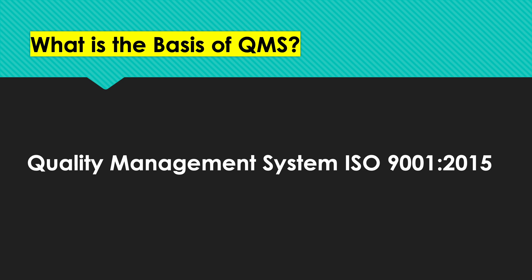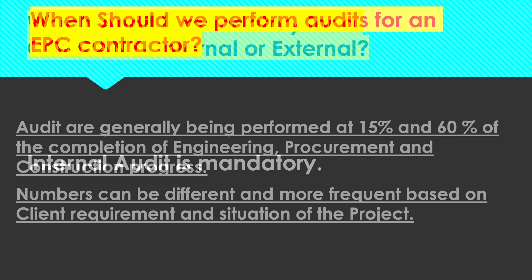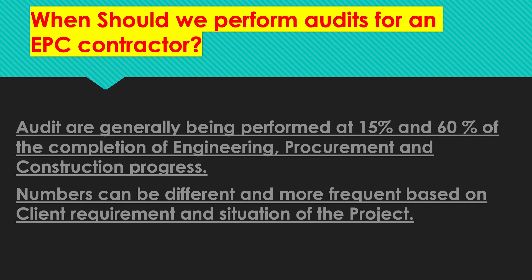I am talking about those projects which are following American standards. Which audit is mandatory for a company — internal or external? Internal audit is mandatory. When should we perform an audit for an EPC contractor? Audits are generally performed at 15% and 60% of the completion of engineering, procurement, or construction progress — separately.